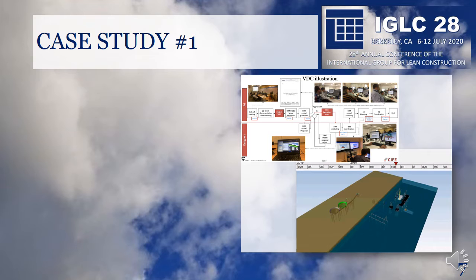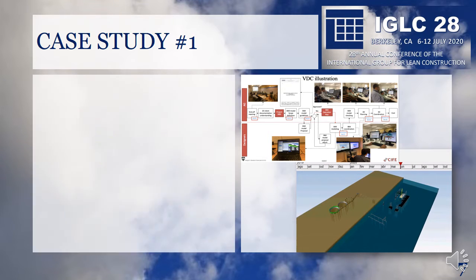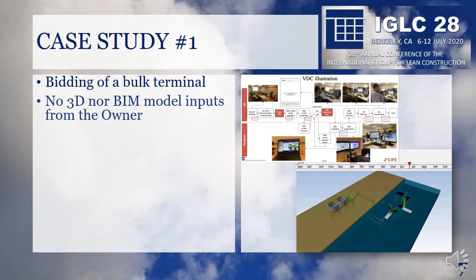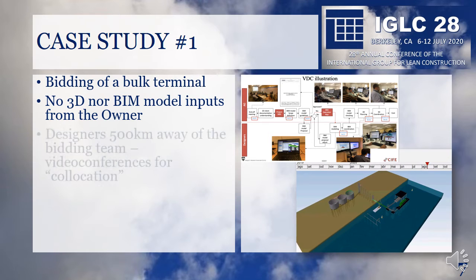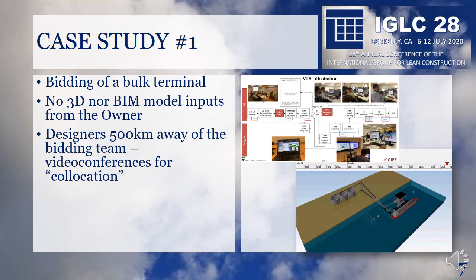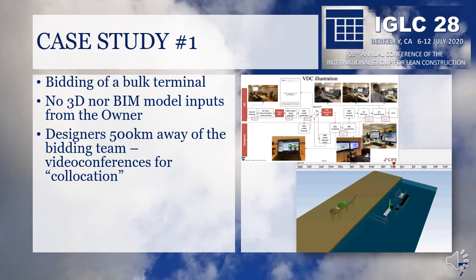Let's now start with the discussion of our case studies. The first one was a bulk terminal bidding. As there was no 3D or BIM model available on the inputs from the client, a design company was subcontracted to do the modeling based on the 2D documentation provided. Physical collocation was not possible as the design team was based approximately 500 kilometers from Andrade Gutierrez headquarters, so video conferences were scheduled as an alternative to do the ICE sessions.